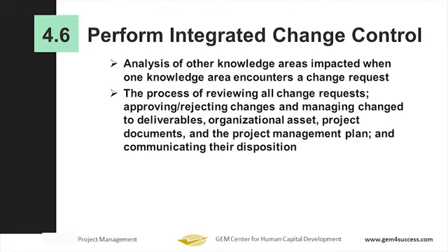In fact, in some cases, some change requests might not have to get to the top. Because, for example, if a change request is coming from the ground, and you realize that you can accommodate it without the baselines changing. For example, part of the baseline is your budget, and you have your schedule baseline, when you want to finish. It's possible that you might be able to accommodate something without affecting your costs, your scope, all those things. You can go ahead. But whatever would affect a pre-signed off baseline of the project has to be approved by higher authorities.